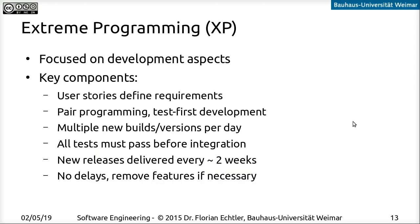Extreme Programming is generally focused on the development aspects, not as much on the management aspects. Key components include user stories as requirements definition — not the traditional user and system requirements documents. We have Pair Programming, test-first development, and multiple new software versions every day. All tests must pass before integrating new code, with a development cycle of roughly two weeks. If we can't make the deadline, we remove features rather than delay the release.